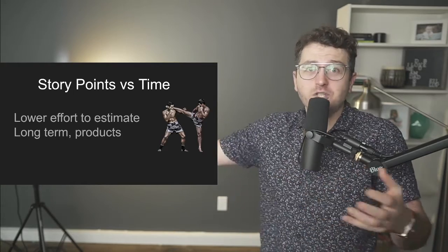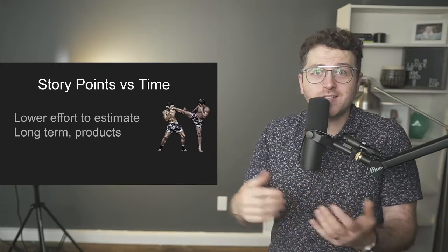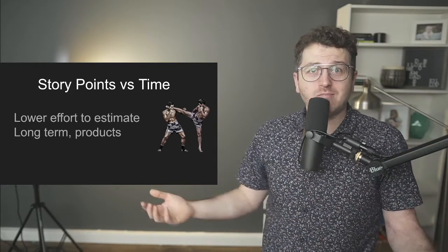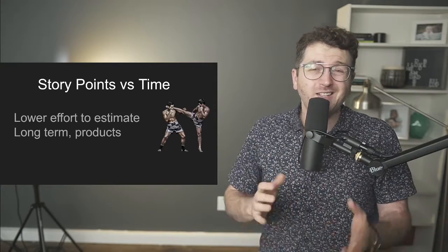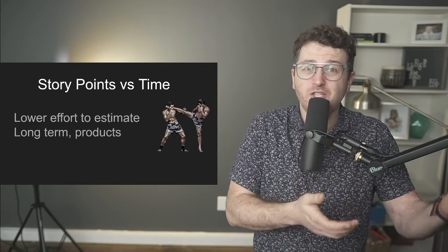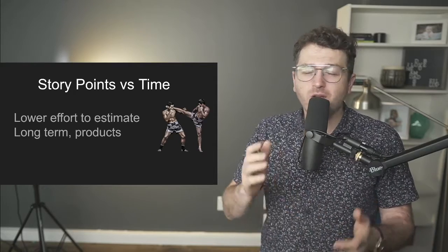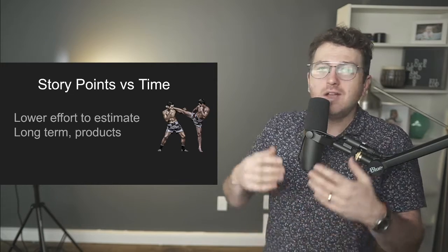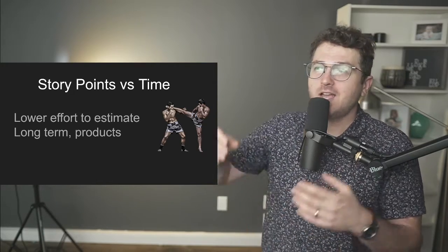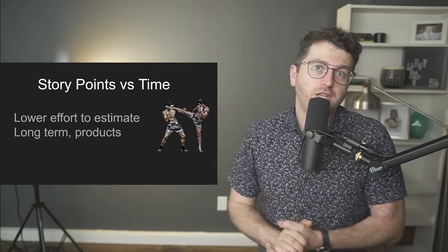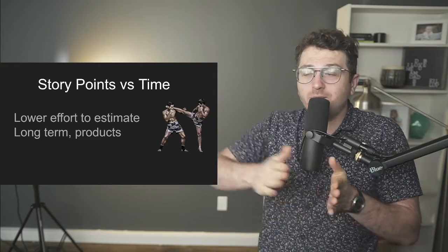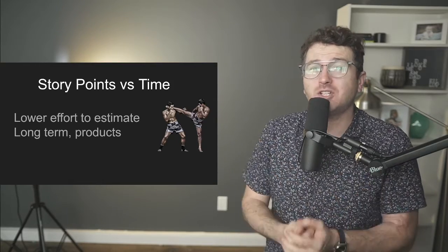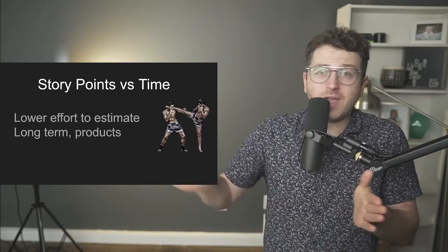At a point, after a few sprints, the project manager can run a report and see, well, this is kind of how many story points we do overall for our development team, which is like 5 developers, kind of like for one full developer would do this many story points. And from there, the project manager can make all these reports where he can estimate even to the point where he says, well, one developer that works 8 hours a day usually does, on average, this many story points in a sprint. And it's way easier for him to estimate long-term how many story points are going to be done for a feature that maybe initially is estimated just ballpark. So it's way faster estimation.